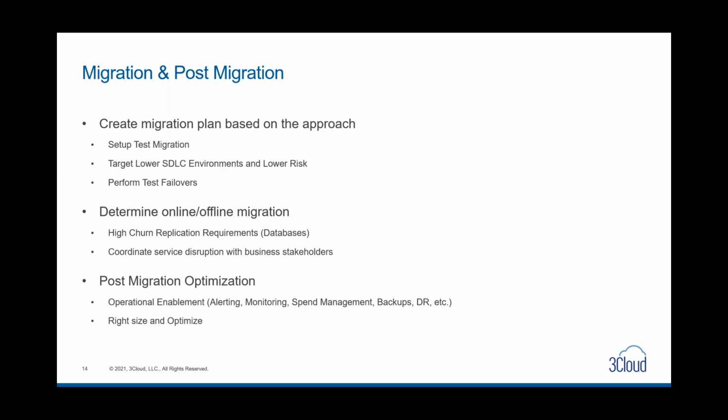We want to create a migration plan based on the approach, right? We want to set up a test migration. We want to maybe just create a VM that has nothing on it and get it through the pipeline without impacting anything, just to make sure that the flow is there. We want to create small wins that create momentum for us.